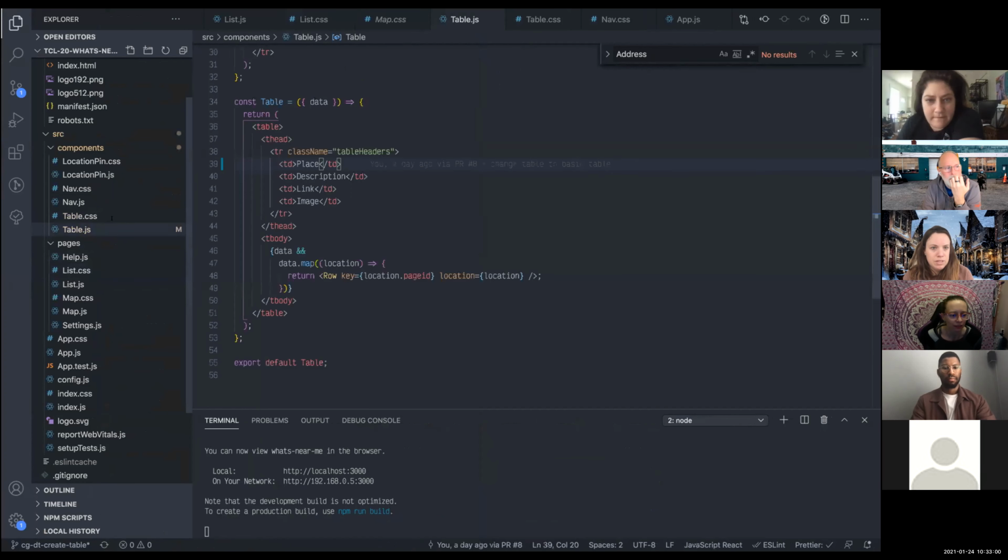So this guideline here, that was kind of what I was talking about. If you're tempted to break a story down along architectural lines or something, you're really creating tasks, not stories. And when a story is so small that it doesn't provide user-facing benefit, I should actually probably change that to definitely too small. It's definitely too small.